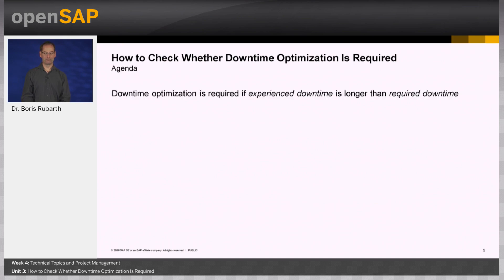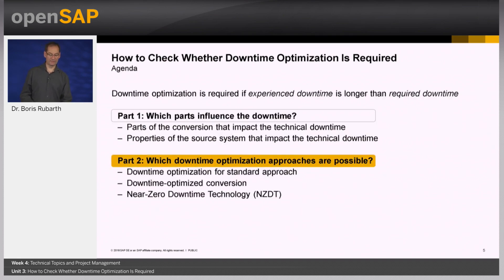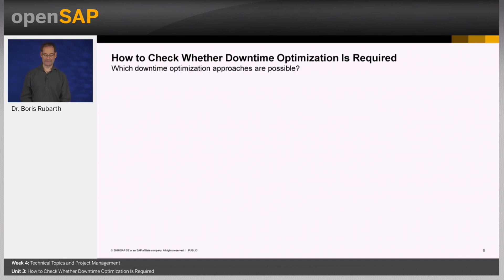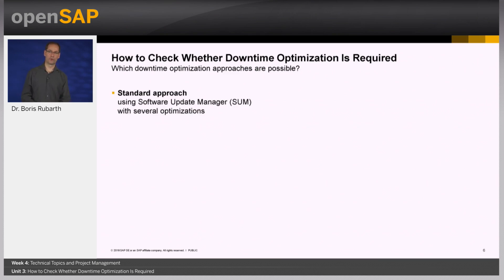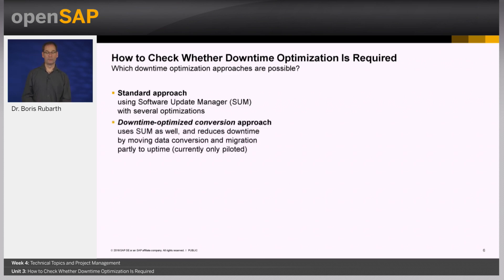Moving to the second part of our journey on downtime optimization: which downtime optimization approaches are possible? We have three approaches. The first is what we call the standard approach — executing the technical conversion with the Software Update Manager. There are optimizations built into the tool, as well as optimizations you can apply yourself, and this approach is improved with every new SP version of the Software Update Manager. If the downtime is too long for your project, you may consider the downtime optimized conversion approach.